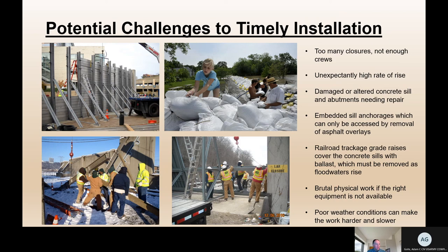And remember, it's brutal physical work if the right equipment isn't available. If you have 10 closures in a community and only four crews, and all the closures have to go in at the same time, then you're bringing in people to do work they're not used to doing, and they're doing really difficult physical labor. And then poor weather conditions can make that work harder and slower.